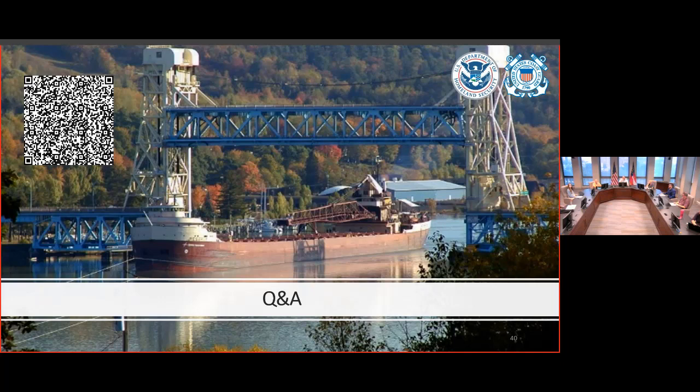If there's not a federal funding component, the Coast Guard would take the lead. I don't want to say it happens rarely, but it does happen. More often than not, FHWA gets the lion's share of our attention, because we're dealing with highway projects, and if there are federal dollars involved, it's going to be FHWA. In which case, we're interested in it. We're going to take a look at it. We're still going to double check it. But again, we're working hand in glove with FHWA on that.